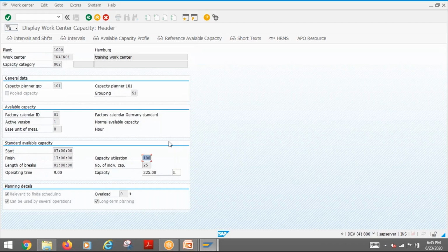Why it is important is, when you are planning your project, you need to consider whether the number of hours or duration you are giving is productive hours, effective hours, or calendar days. It all depends on that. Whatever you are following, you need to follow the same thing everywhere, so you will have consistency. So here, this is where the 9 hours is coming from.